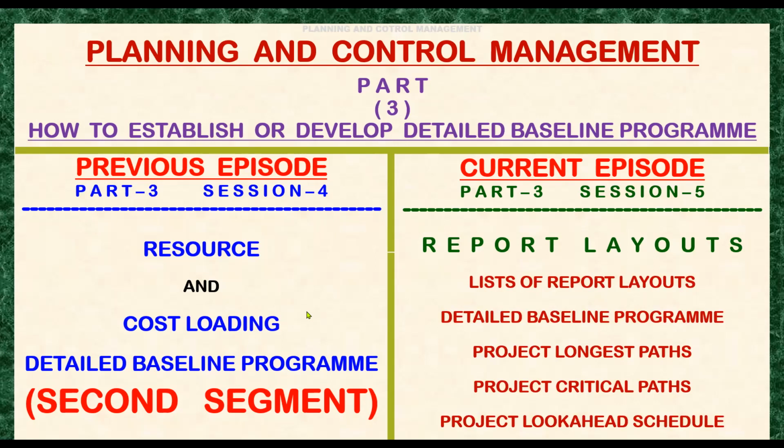Okay, our topic for today is Part 3, Session 5, about creating report layouts for the detailed baseline program. So let's create a minimum list of reports that need to be distributed to project teams for information, reviews, and comments prior to final submission. Actually, this detailed baseline program should be approved by the client before it is used for progress monitoring or updates.